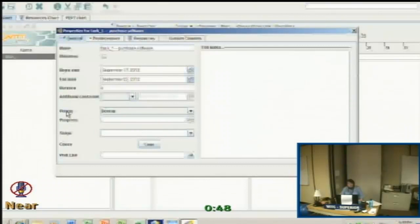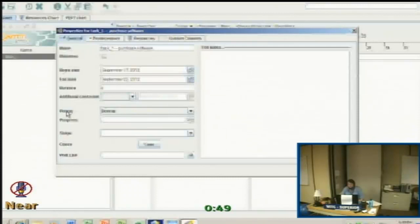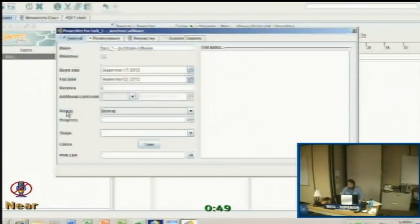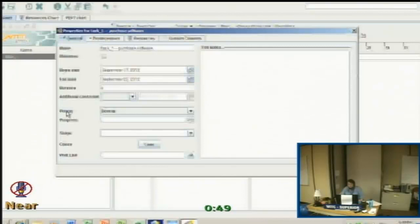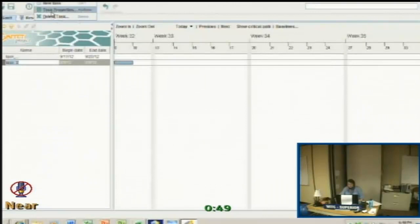Here, if you want to assign a resource to this task, who's going to do this task? Who's going to handle this one and take care of it? You can click on the resources item. I'm going to say the project manager, Allison, is in charge of this 100%. You could assign more than one person to this. Now I'm going to click on OK. So Allison is in charge of this. Did you get names? Where she went to? We found them. Now I see it's 10 to, our ITV is going to cut off at 7 o'clock. So I'm very quickly just going to add a couple more tasks so you can see what the calendar looks like once we get some tasks added. So I went up and clicked on task, new task. Then I'm going to go up and click on task properties. Task two, install software.